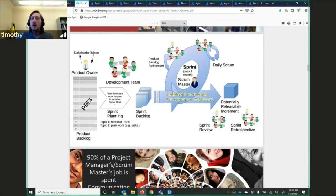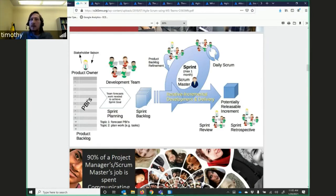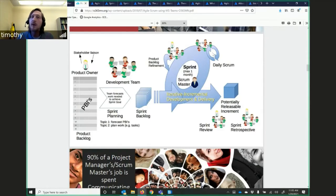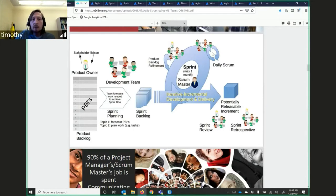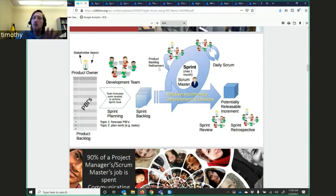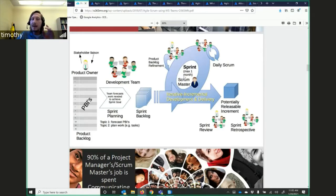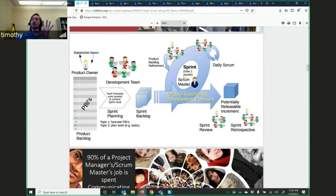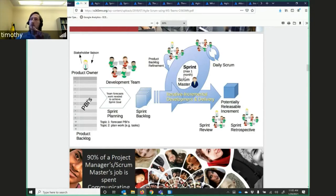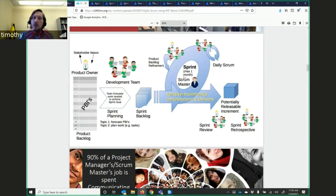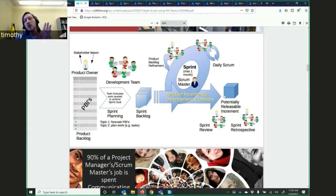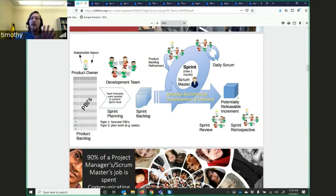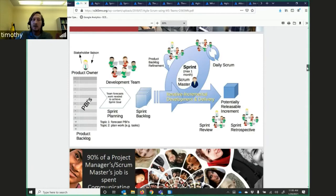They go into the sprint. Every day of the sprint, you have a scrum meeting, a stand-up, usually like 15-minute, real quick meeting to get everybody on board. Towards the end, you have a product backlog refinement meeting in order to look what has happened. The sprint, maximum of one month. These are very short processing cycles so that you can address whatever is going on in that processing cycle or that development cycle and implement it and release product. Then you have a sprint review at the end and a sprint retrospective. You have the product patch that kind of comes out of that.